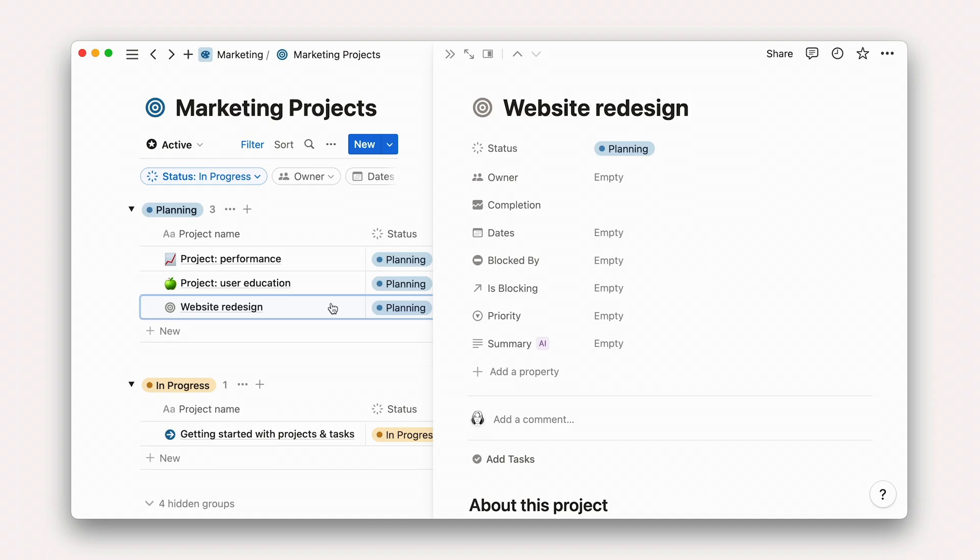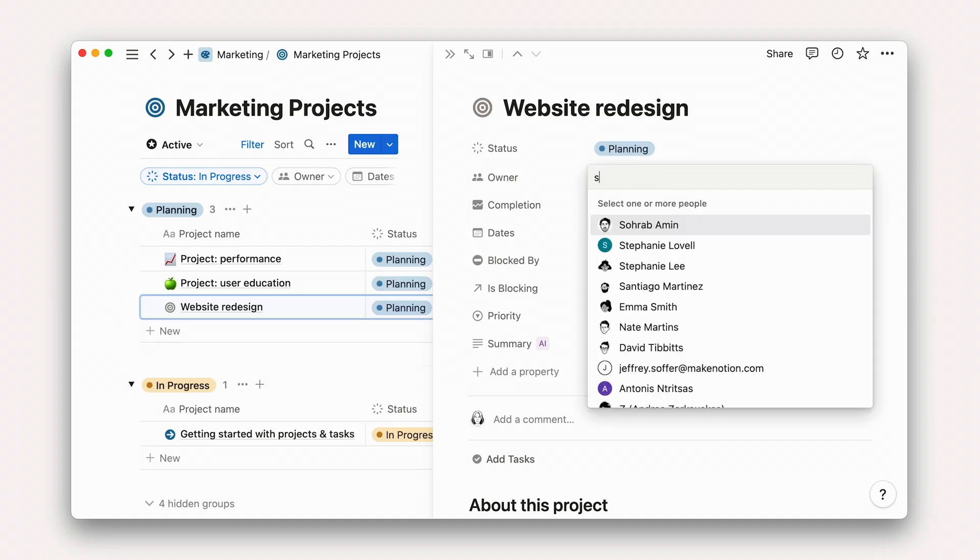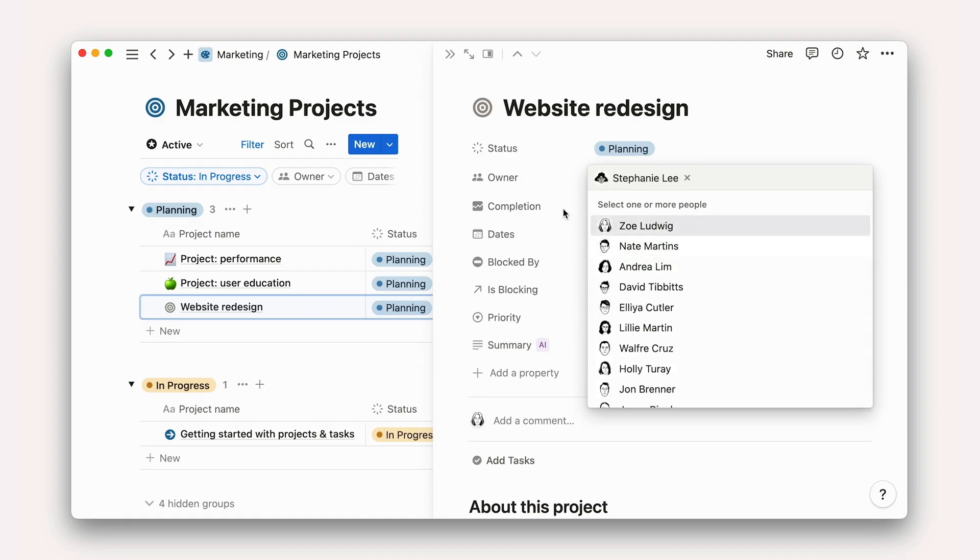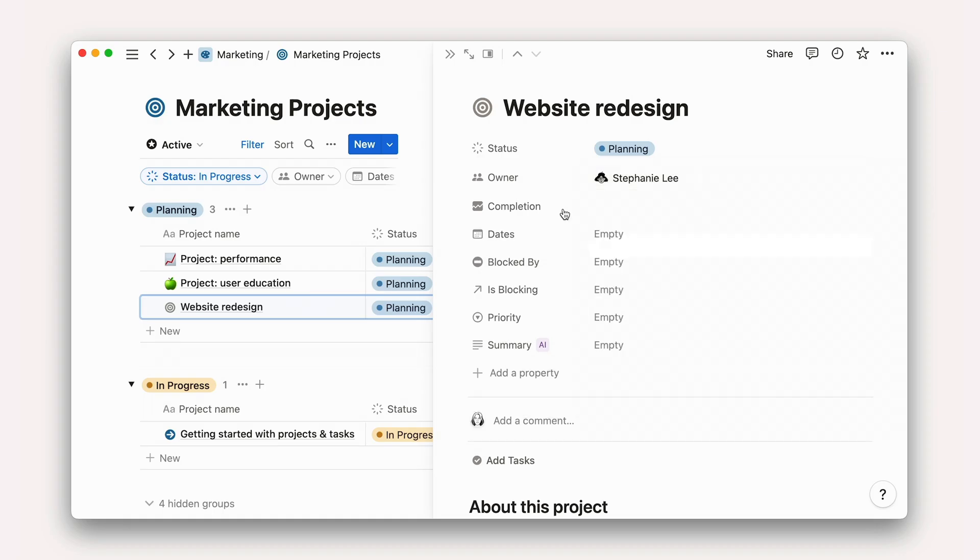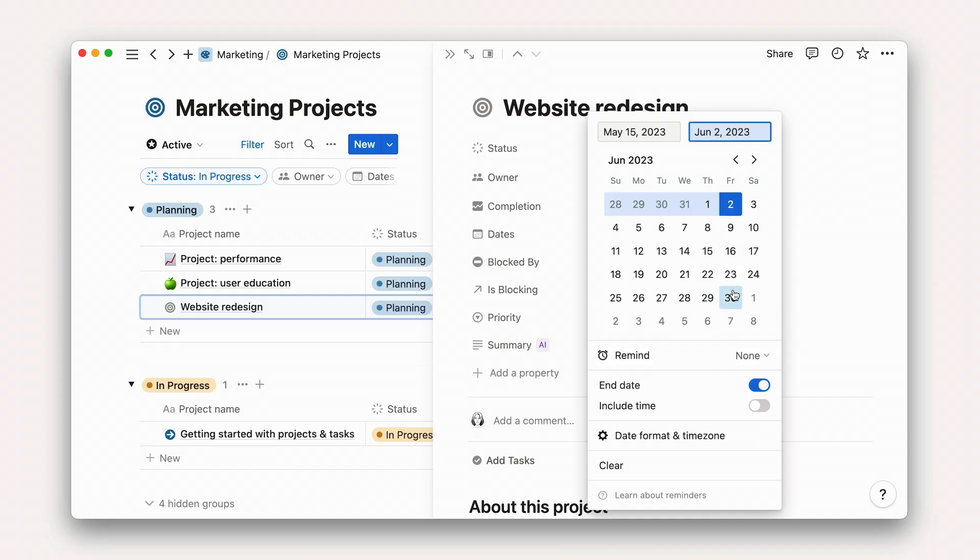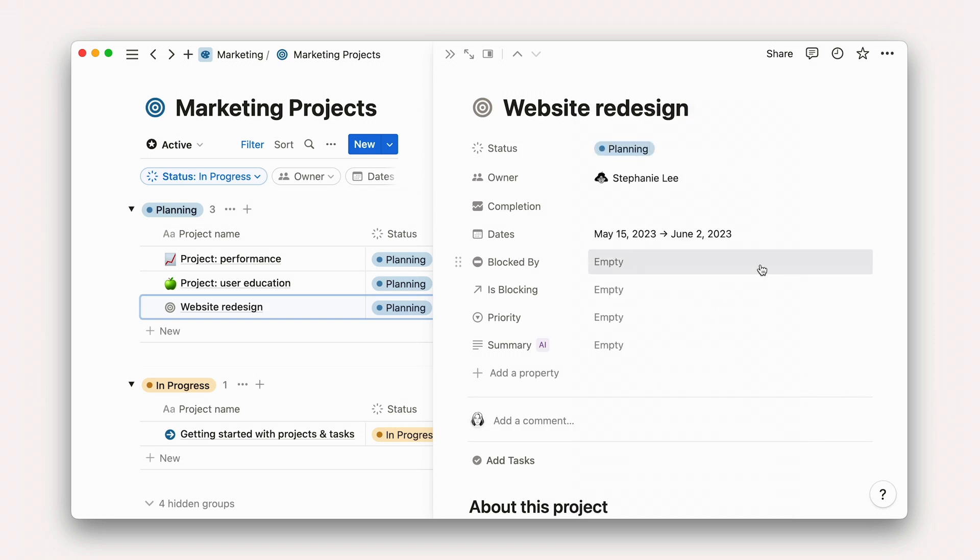Let's begin our project plan by filling out the properties at the top of the page, adding an owner, project dates, and priority. If this project was dependent on another project in this database being completed before work can begin, you could add that here too.